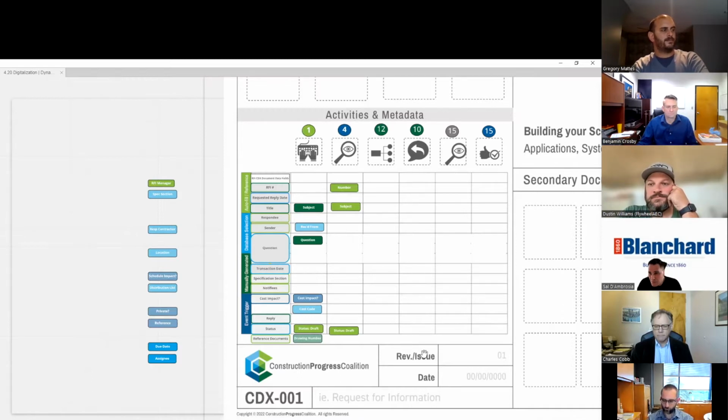One of the dynamics I was clearly missing was this: in my arena, I'm working with a fabricator, and he assigns his number to it. Then as soon as it gets into the Procore system, which is natural and should happen, the GC's new number dictates. There's this disconnect that begins to happen where you're trying to find this stuff because the information in front of you has the originator's RFI number, but we're all looking at the new numbers.